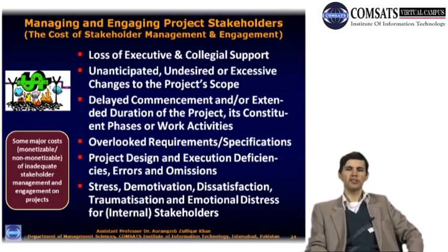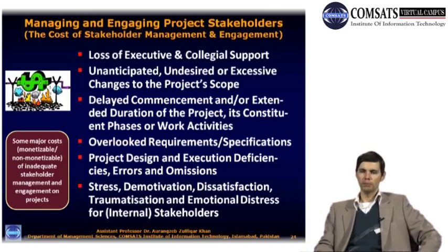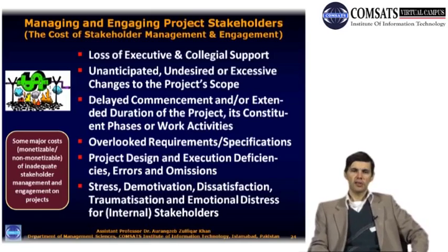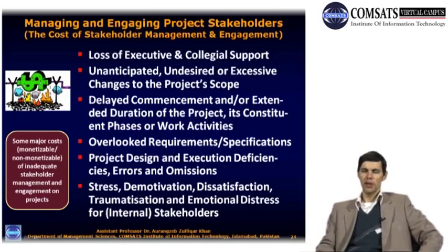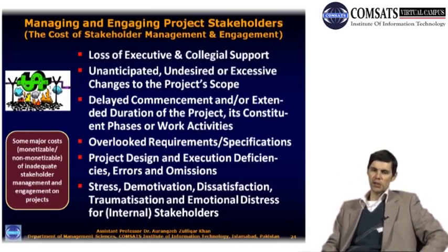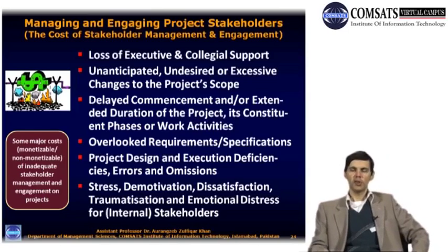Unanticipated, undesired or excessive changes to the project scope. A lot of changes bring a lot of costs with them if there's constant changes. Delayed commencement or extended duration of the project and its work activities. Yes, this has a big cost as well as a time dimension. Overlooked requirements and specifications.